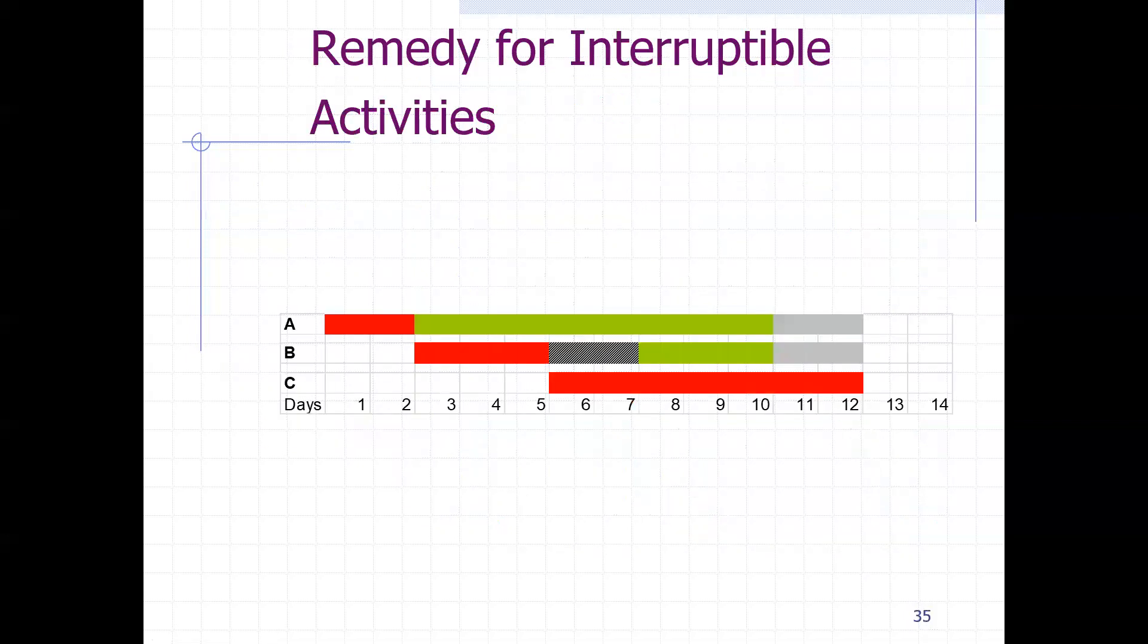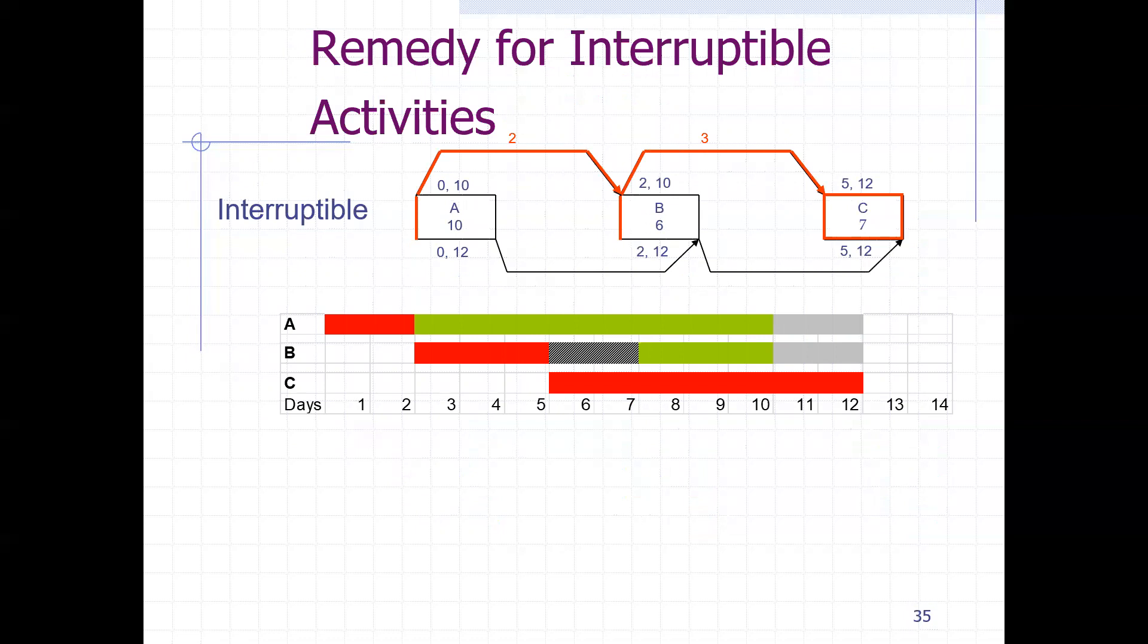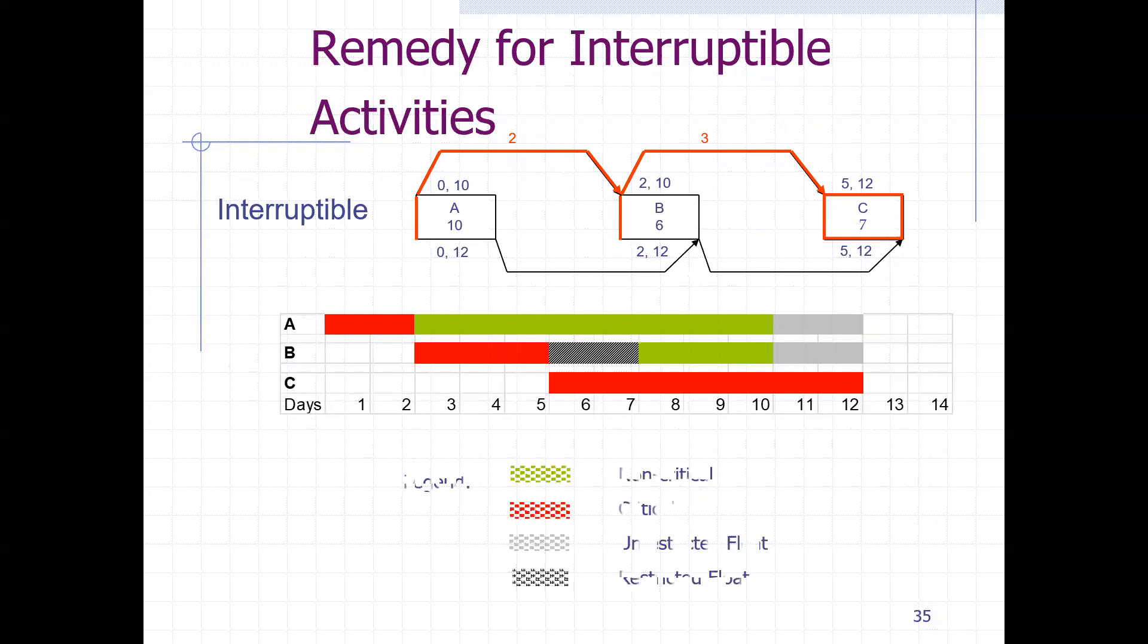So then what's the remedy? There are remedies actually for each one of them. So for the interruptible activities, we have two approaches to go by. The first one is to stretch the activities that have restricted float until they fill the restricted duration. In other words, it's eliminating the restricted floats. So you can have, for instance, A, it must start here with a duration of 10, and the rest is flexible.